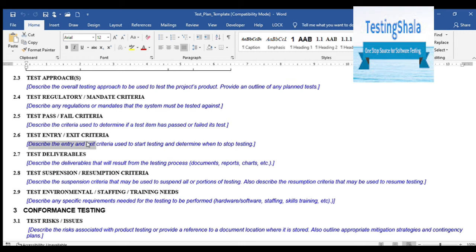You should clearly call out when you will be starting your testing and when you will say you are done. Normally, entry criteria would be when the build is available or stable and everything is ready for testing. For exit, you will define when the minimum threshold of test coverage, pass rate, fail rate, or defect count is met — whatever criteria you define in your project can be clearly called out in this section.